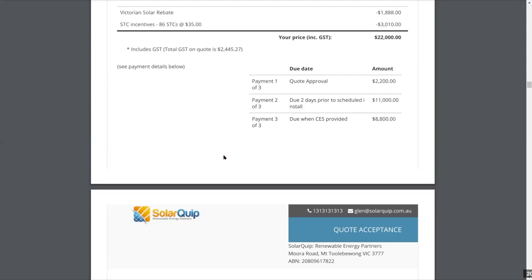With the payment schedule, we have the ability to set up event-triggered invoicing and receipting. We also link out to the Xero accounting system via an API, so any installers using Xero will find this links completely seamlessly with their Xero account — and it will process payments and create receipts in Solar Plus. We also link to Stripe Pay, a standard merchant facility many installers use, so the invoice goes out with a pay now button. All your customer does is click pay now, that creates the invoice, the money goes to your account, the receipt goes to the customer, it gets put into your payment log, and it also moves the job onto the next stage — it really does automate that payment process.